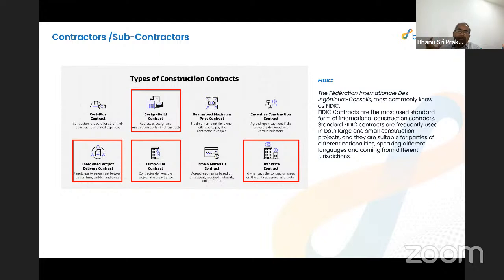100 crores can vary because that is the contingency which is kept. These are the wrong aspects of the industry. No, we shouldn't. The contingency is for the unforeseen. Contingency is not for our own errors and mistakes. So this is the approach.